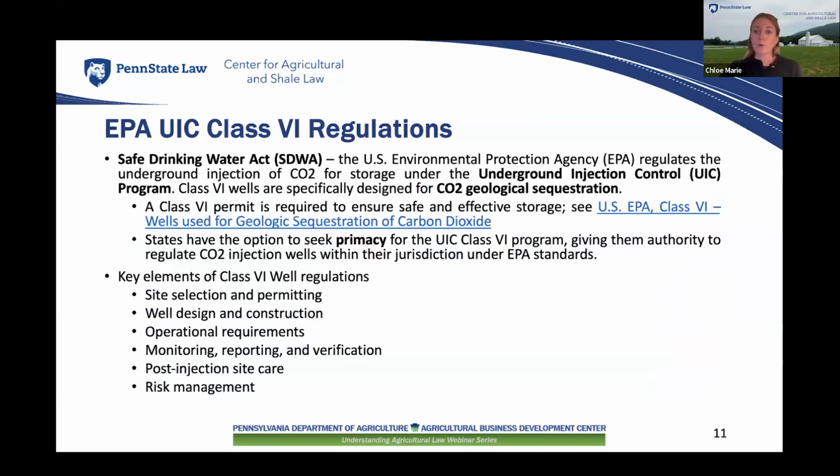For the specific purpose of CO2 storage, the EPA enforces regulations for Class 6 wells, which are specifically designed for the geologic sequestration of CO2. And entities wishing to store CO2 underground must obtain a Class 6 permit to ensure compliance with these protective measures.